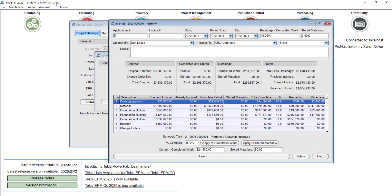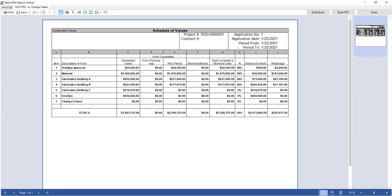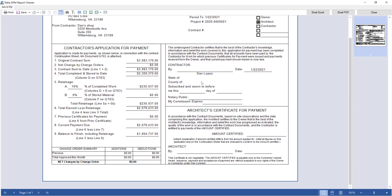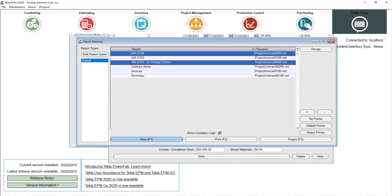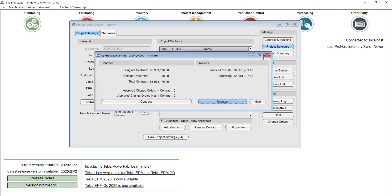If I save my invoice and go to the reports, I'll pull the G702 and G703 — the two most utilized formats in the steel fabrication industry. This is the schedule of values or the G703 report. You can see the amount of money for this period and the retention percentage taken out for each item. The next application will include the amounts from the previous application plus the new values. The AIA G702 is also very needed to get the stamp in order to get paid. Hopefully this helps you control how much you have invoiced. Thank you for watching and stay tuned for new videos.